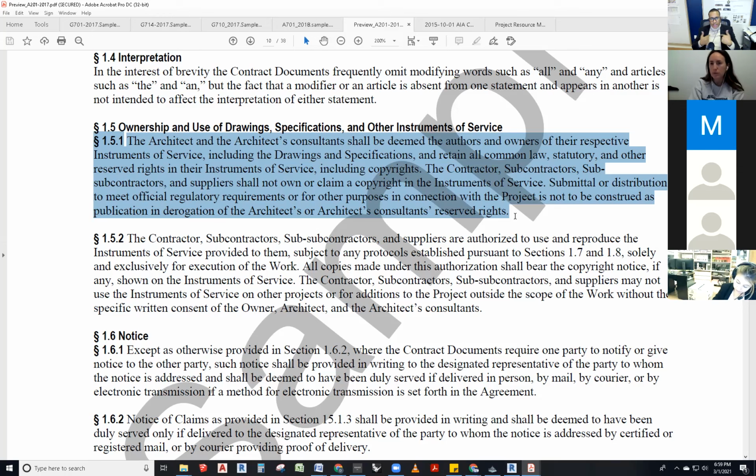Technically, we are granted a limited license of the plumbing engineering drawings, electrical engineering drawings, fire protection engineering drawings, and so forth and so on. And we transfer that limited license to the owner via the contract, because the C401 says we have the right to those for that particular project. And there's a fee that we have to pay the consultants for that license. Should they not be continuing on the job, or should we not be continuing on the job? The owner pays us, we pay them. We all get paid. Okay?